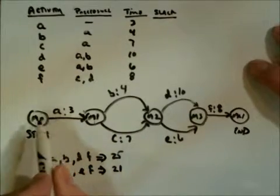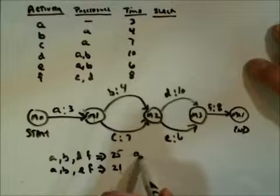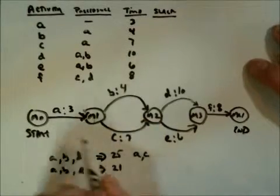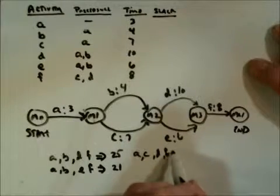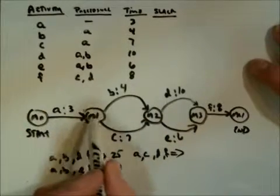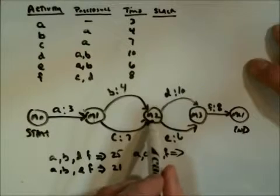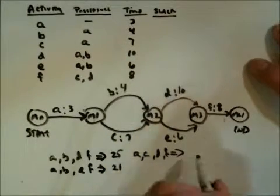Going the other direction down below here, I could go A to C, to D, and then F would be 3. 7 is 10, 10 is 20, 28.